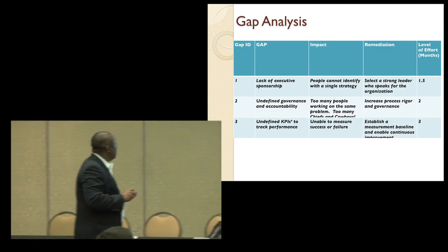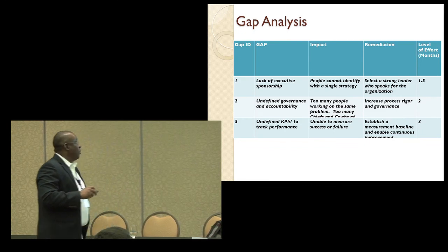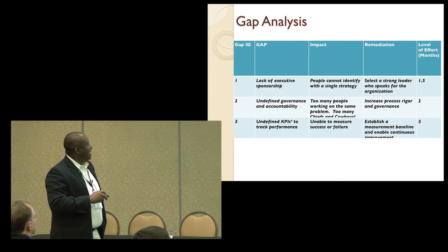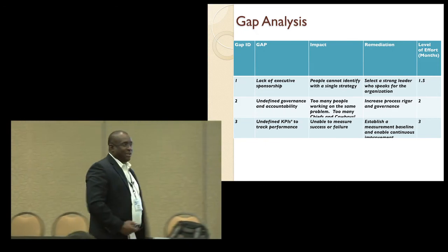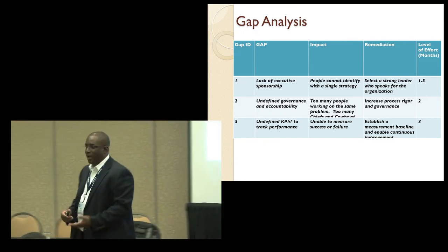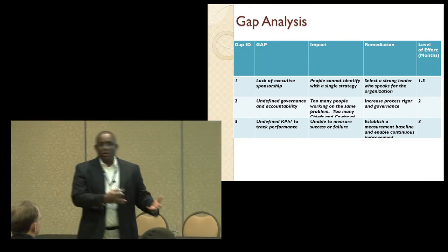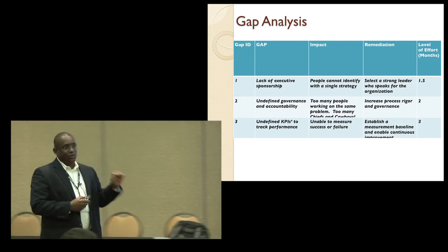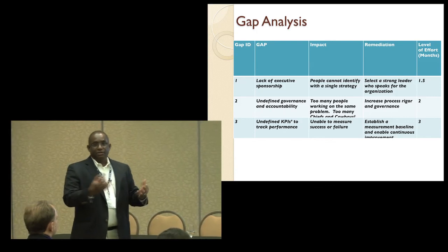As you set up this gap analysis, you have an idea gap. What's the impact on the organization? How are you going to remediate that? And level of effort. There's nothing like walking into an executive and saying, X is wrong. Well, what does this impact? Well, how are you going to fix it? How long does it take? All of these questions. How much does it cost? Part of this process is to make sure that you have clear, succinct information for the executives that you're speaking to.